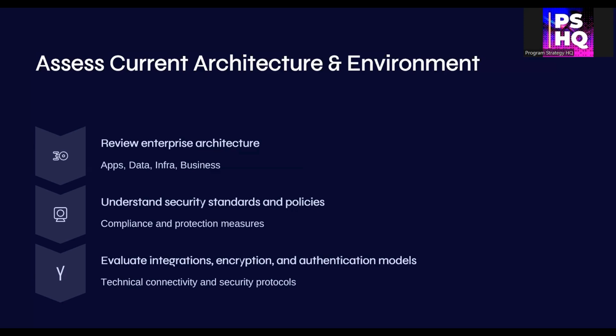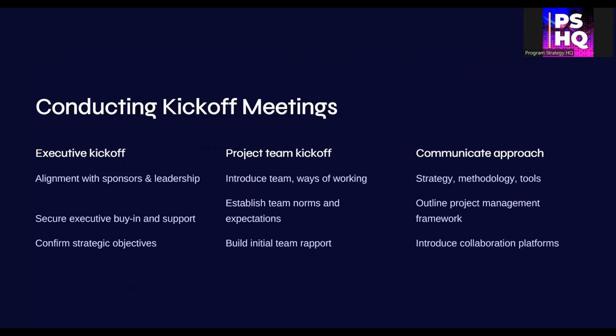Kickoffs are not just formalities, they are your launchpad. The executive kickoff is about alignment. Make sure leadership is informed and bought in. The project team kickoff introduces the team, defines norms, and explains how you'll work together. And then present your delivery methodology, tools, and platforms so that everyone knows what to expect.